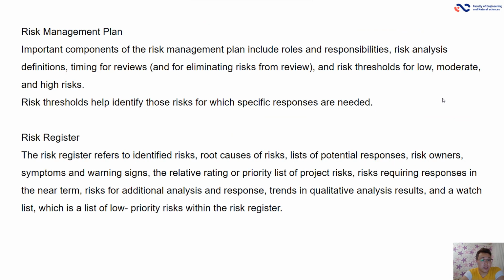The important components of the risk management plan include roles and responsibilities, risk analysis definitions, timing for reviews, and for eliminating risk from review, and risk thresholds for low, moderate, and high risk. Risk thresholds help identify those risks for which specific responses are needed.